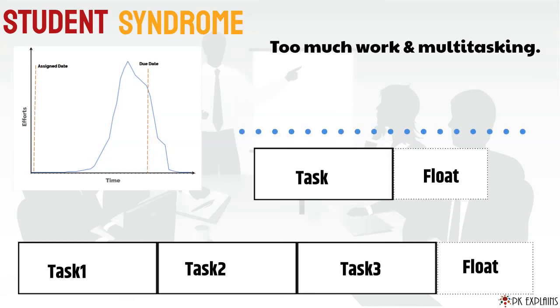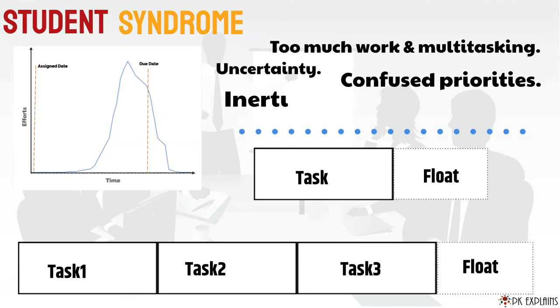However, beware. Before you do this, you have to remember that too much work and multitasking, uncertainty, unclear priorities, and inertia are also causes of student syndrome. Without paying attention to these issues, removing buffers may backfire. And you may end up introducing delays in the project's progress.